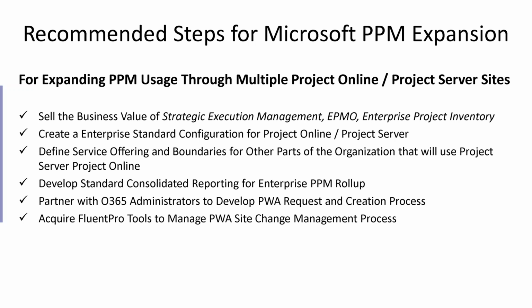An important step, if the IT PMO or EPMO are not the Office 365 administrators, you need to partner with them in the context of developing a process for PWA request and the creation of that PWA site, both the test, dev, production if you're going to have 3, or if it's going to be only test and production for the new organization. So you have to get that process well defined.